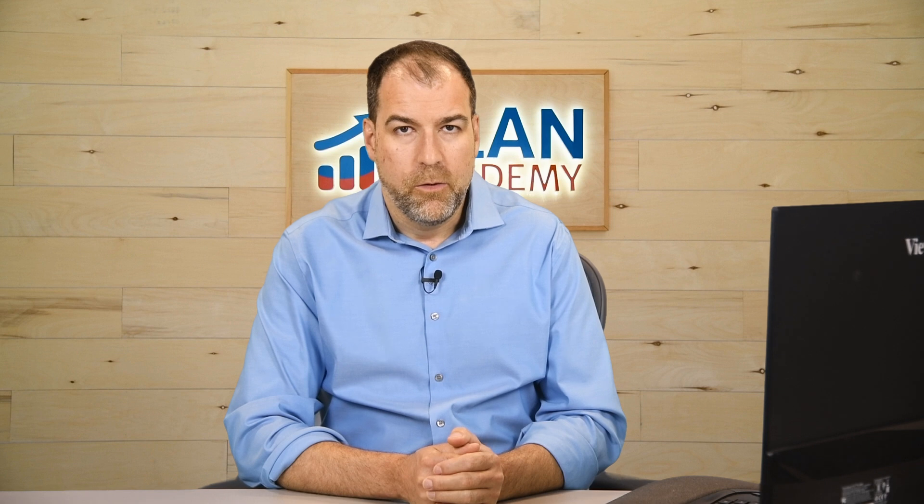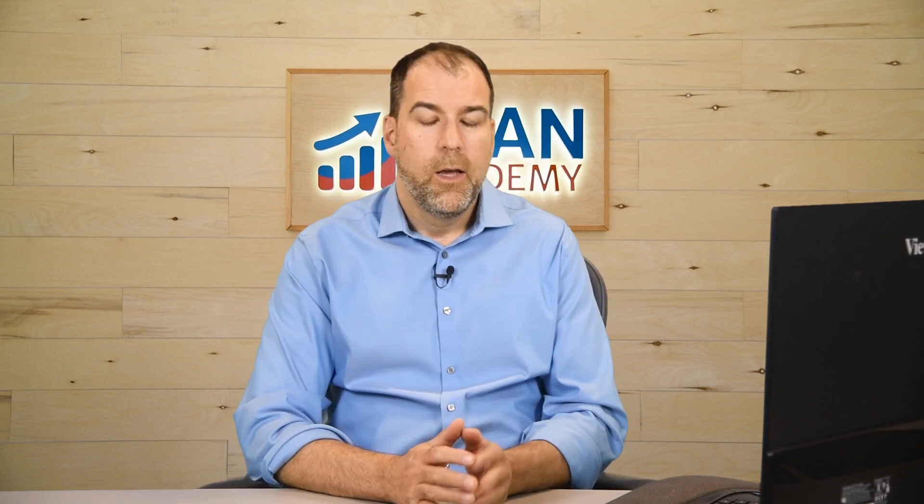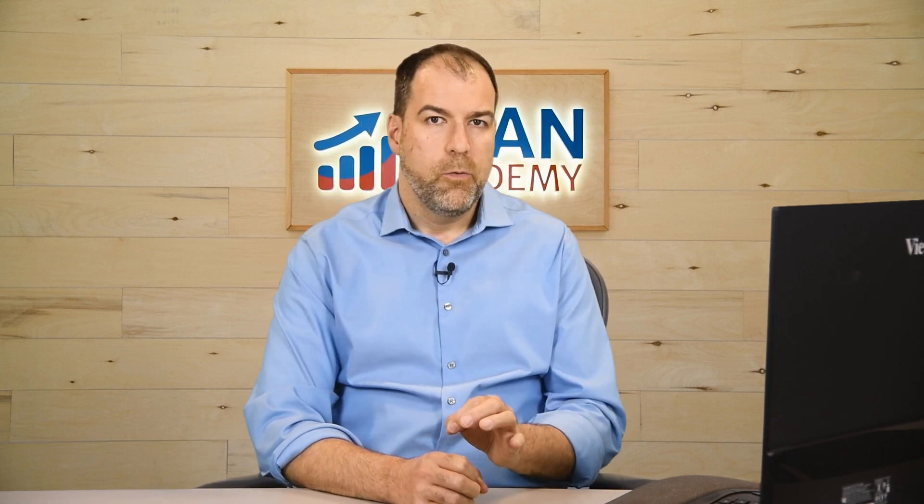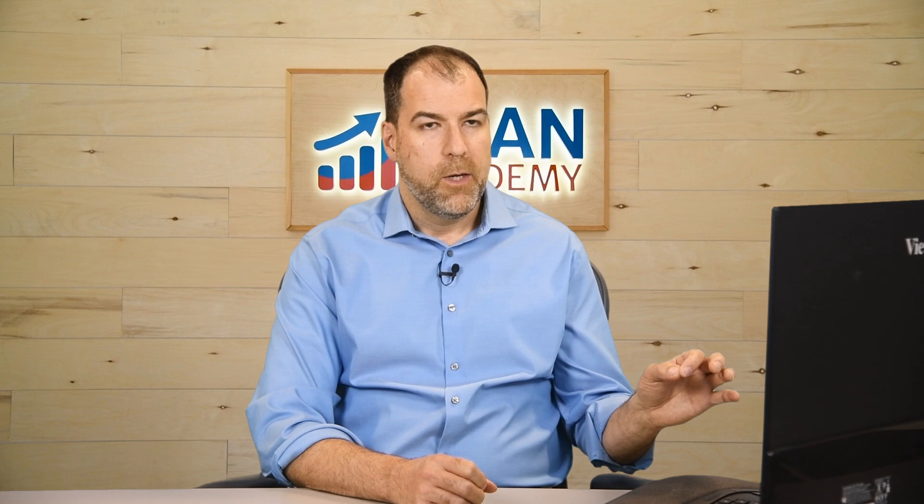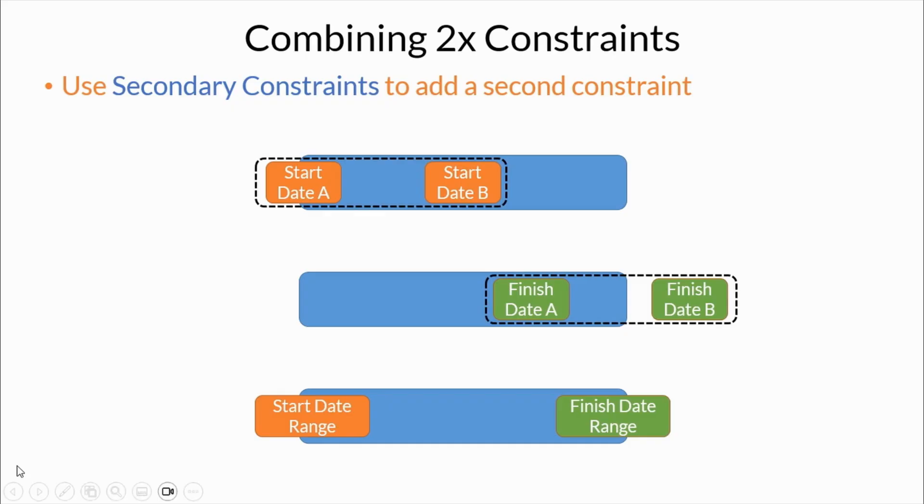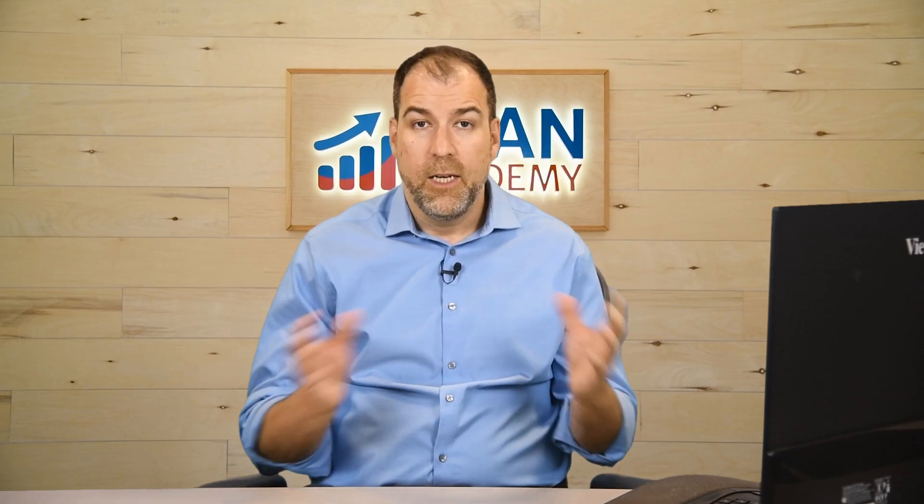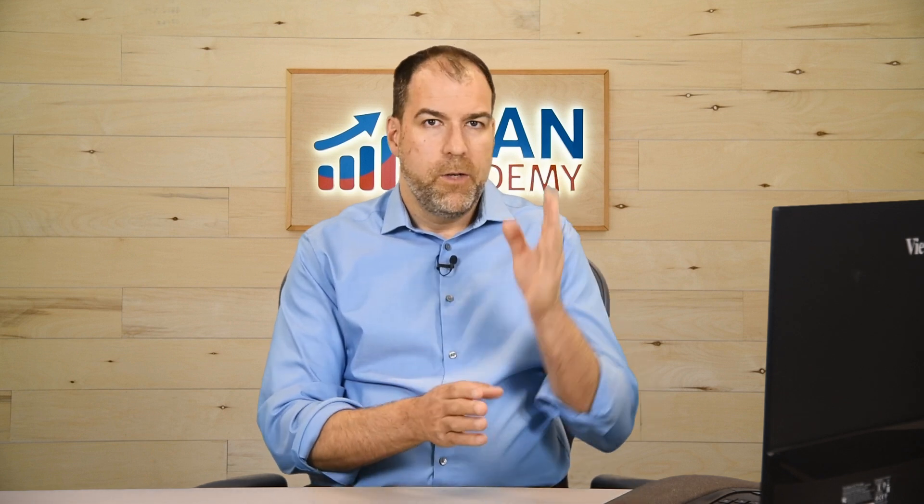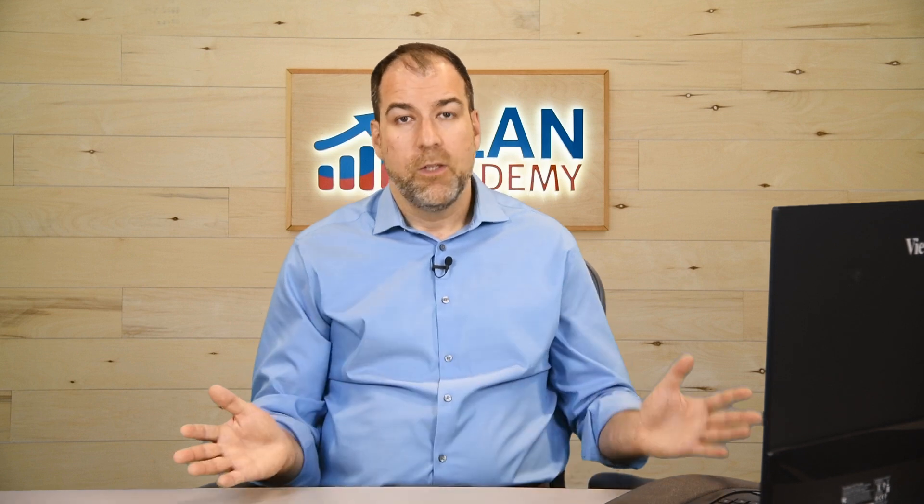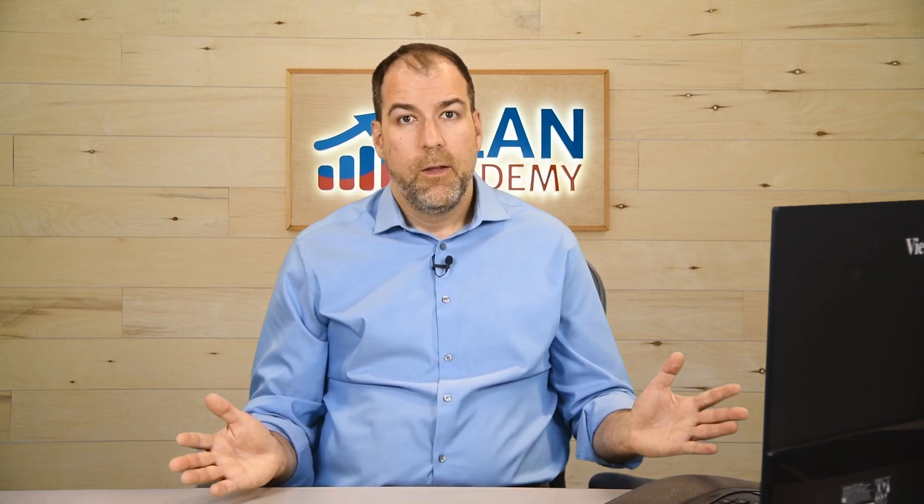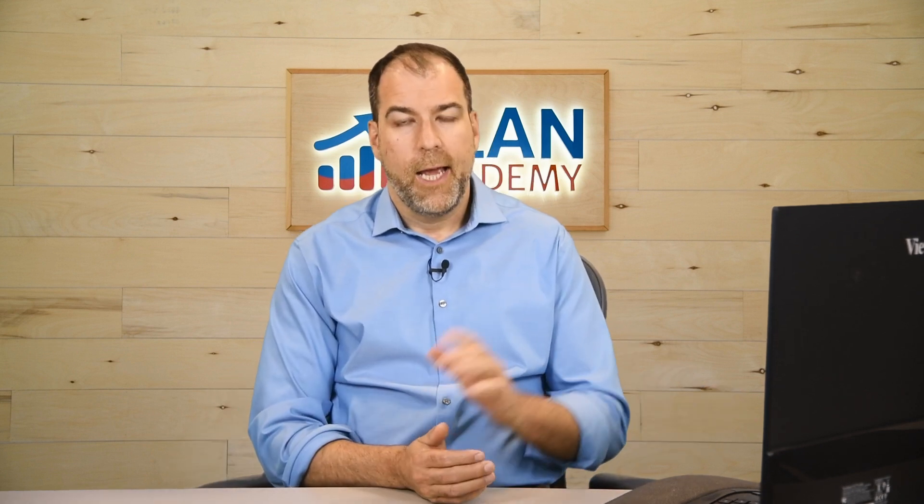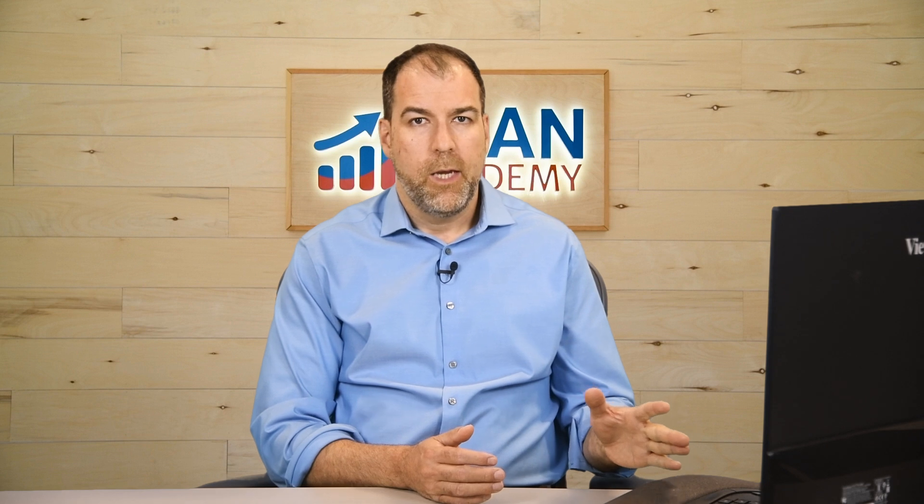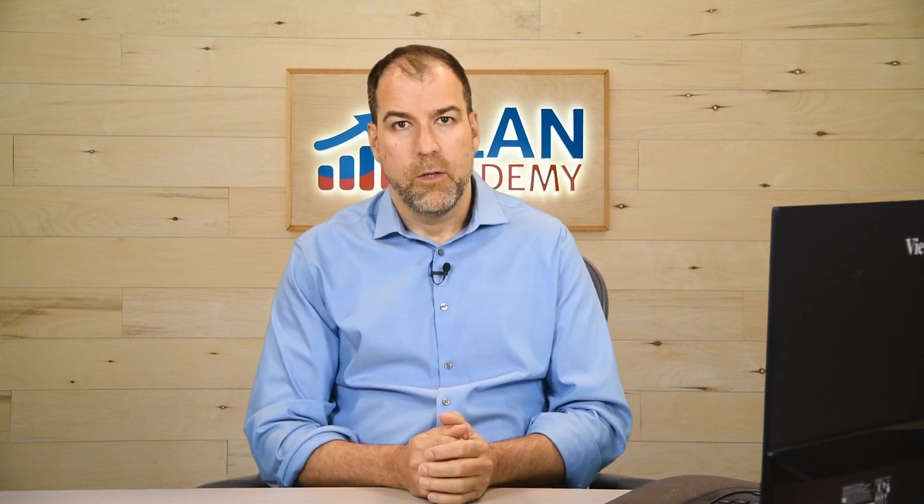Okay, how important is this to you? Should we be using these? I would say there are some situations where this would come in handy. In particular, the last option of using a start and finish date constraint. If you did want to limit say an interim milestone, where you wanted to finish on a particular date with some leniency in this date range, I think it would work really well in that situation. There may also be times when this is overkill, but I did want to have a discussion about how these work and whether you can find some creative ways to use them in your scheduling.